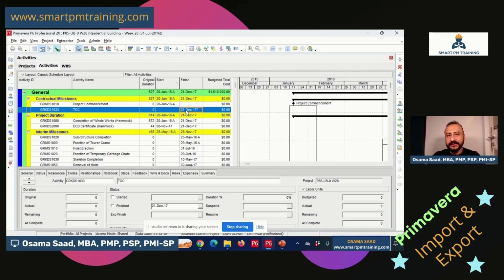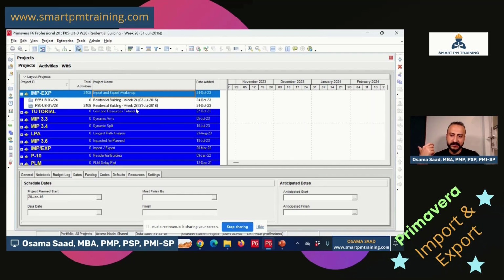Maybe you tried to be smart and do something in the lags, constraints, you change the durations, whatever it might be. You can right now run schedule comparison or schedule digger between both files. The original schedule update itself and the bifurcated one. This one right now should have a data date 31st of July. You can see it here at the bottom, 31st of July. So it's a schedule twin, but maybe different logic.